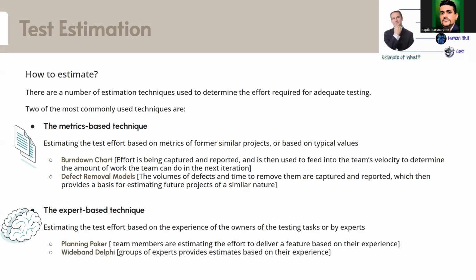Or you could not find the correct sand, so you use an alternative. Or you could not use the correct size of bricks, so you have to use some alternative. So material impact is there. At the same time, you thought of using some experienced masons and skilled people, but unfortunately you couldn't find them. You use very junior people, and because of that the estimation gets impacted.